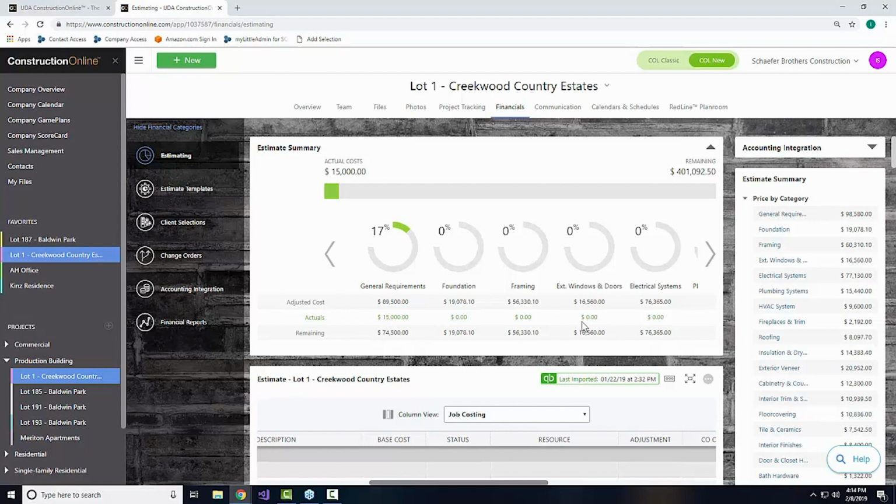Yeah, and as we're going through and adding in these costs, spending in various different areas, or shift over to the invoicing view so that we can see how much money we're collecting on these various different areas. Again, the dashboard gives you that quick glance. It's almost like we're trying to track our progress so that when we do decide to step into progress invoicing, we know what numbers have to be there for each of these sections and can get those percentages correct.